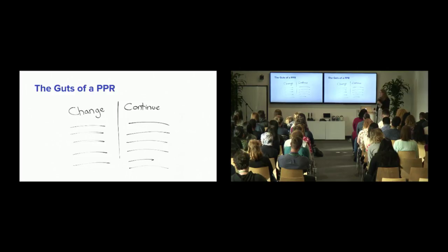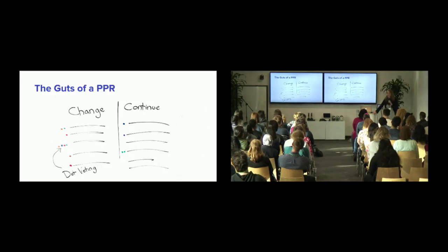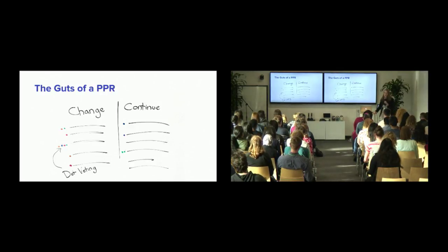And then the major activity coming out of this is you ask everybody in the room and or on the phone or remote or however it is to vote on which of these changes and continues are the most applicable to them or they think are the most important. Because you talk about so much within this session, we're trying to identify what are the most consistent themes and patterns across all of the projects in our shop that give us an opportunity to change or to continue.